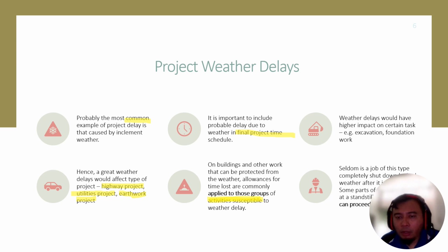Weather delays will have a higher impact on certain tasks, as I mentioned before, and seldom is a job of this type completely shut down due to weather and brought to a standstill. Usually, unless it's very bizarre rain and heavy flooding, it won't cause your project to stop. Something such as war would cause your project to come to a complete stop. But weather only causes delays, and you still need to consider adding more duration to your activities.